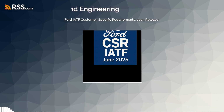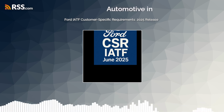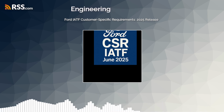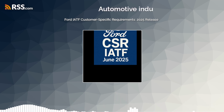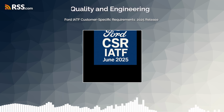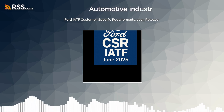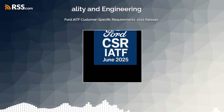Now, what about prototypes? Making the first few parts for testing. Does the document cover that? Prototypes are mentioned with specific requirements. Yes. For prototype fabrication, the expectation is clear. Organizations must use the data generated during prototype builds to inform and plan for the subsequent production process. You learn from the prototype. You have to record detailed dimensional data according to the prototype build control plan, a temporary control plan just for the prototype phase. This data is then reviewed with the Ford product development engineer responsible for the part, and you need to obtain their approval, signifying their acceptance of the prototype parts based on the data. All this is documented using the APQP evidence workbook.